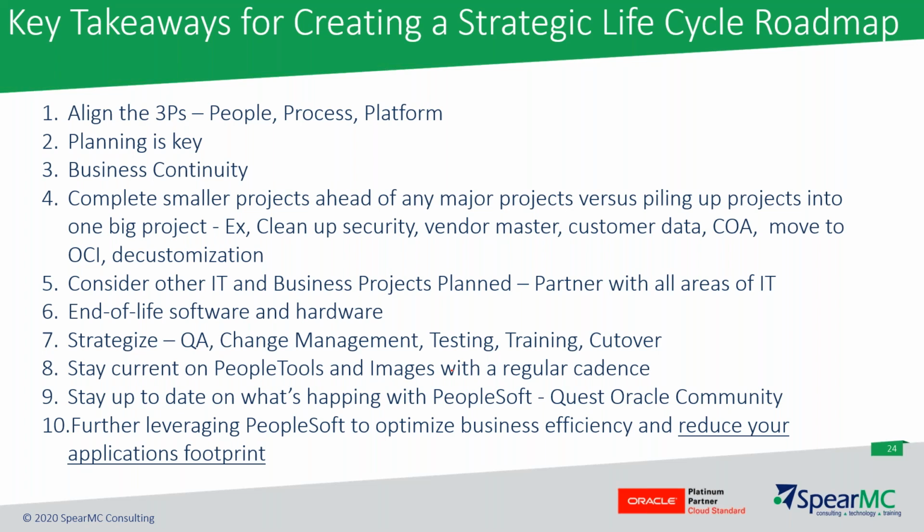As part of the roadmap that I provided, I did have some smaller projects that were completed ahead of time. Really important, you think about any cleanup efforts you have to do. One popular one is chart of accounts. Another one is suppliers and customers, making sure that's all cleaned up. These little efforts to remove duplicates or consolidate records, and maybe simplify your chart of accounts wherever you can and consolidate chart fields. Really, really great stuff to think about before you start a major get current effort.